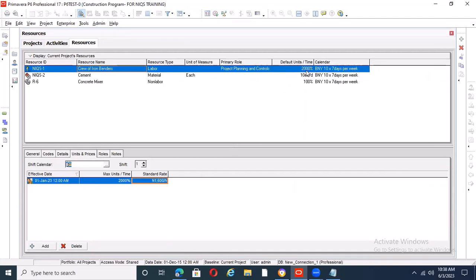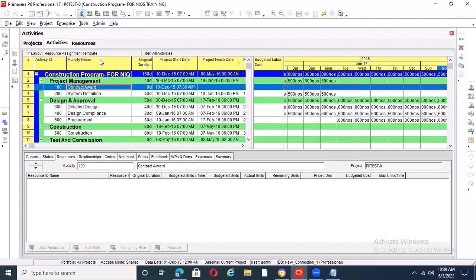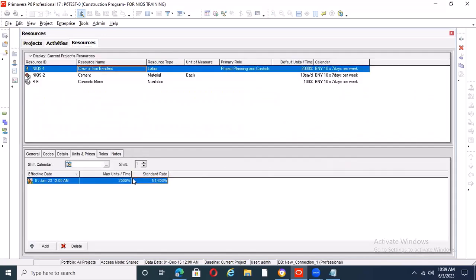So we know we have this number of persons, not a problem. Remember, each of your activities does not have this number. Now, you have assigned the standard rate. So from your BOQ, now you know the rate. So let's assume you have your BOQ, you are transferring your activity descriptions under this place, your activity name. You're breaking them down here. And you have your rate. Your rate for those activities is what you transfer in here.